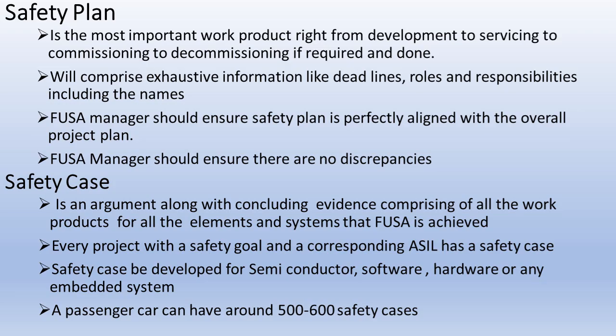What is meant by safety plan? Safety plan is the most important work product, right from development to servicing to commissioning to decommissioning if required. Safety plan clearly mentions exhaustive information like deadlines, roles and responsibilities. And the FUSA manager should ensure the safety plan is perfectly aligned with the overall project plan and that there are no discrepancies. In the safety plan, how exactly each and every component is going to be developed so that it meets the overall FUSA development, that clear-cut plan is called the safety plan.